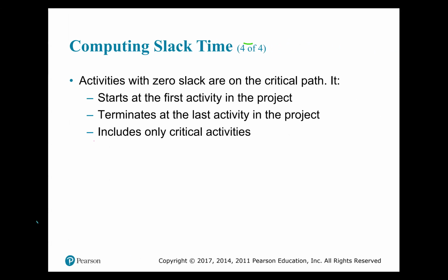All right, now, any activity in which you make the calculation of either the late start minus the early start or the late finish minus the early finish, and you get a 0, that activity is called a critical activity, right?